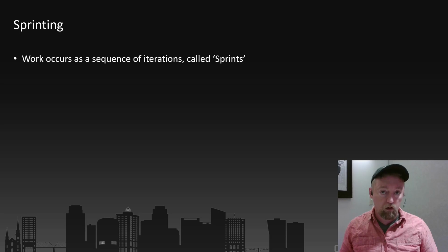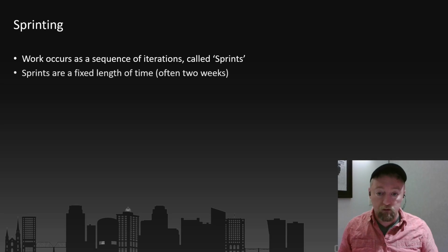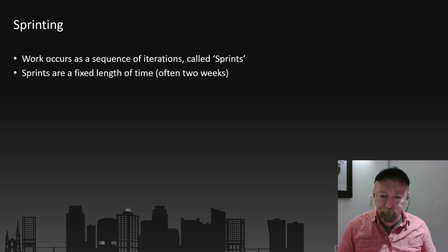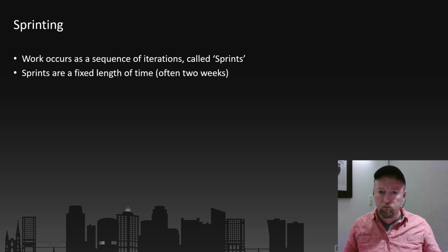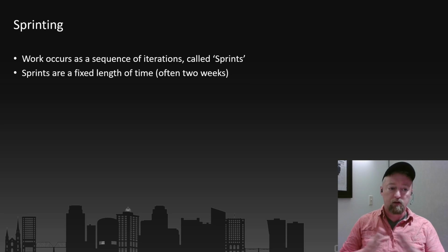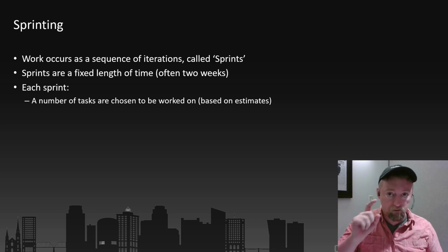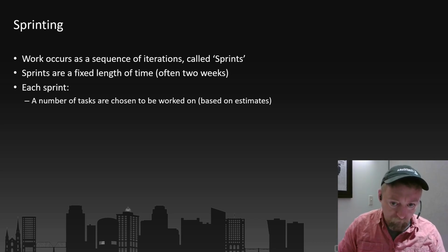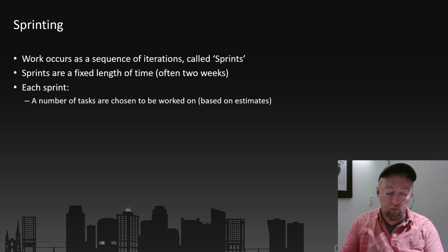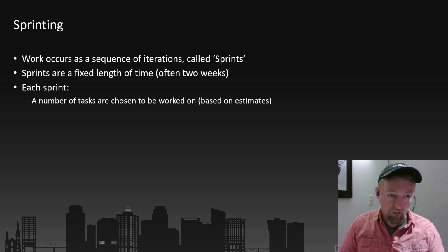In Scrum, you work in iterations we call sprints. A sprint is just some fixed amount of time. No real hard rules about how long it should be, although we almost always choose 2 weeks. This is a span of time where you choose a number of those cards, those tickets, to work on, based on the amount of time and how long we predict each one will take.